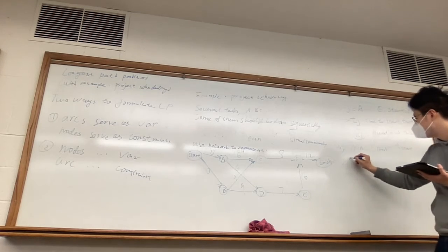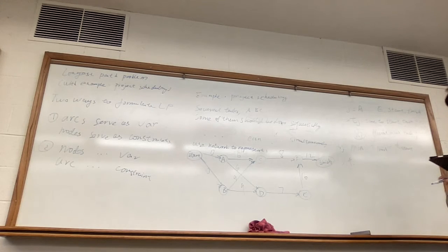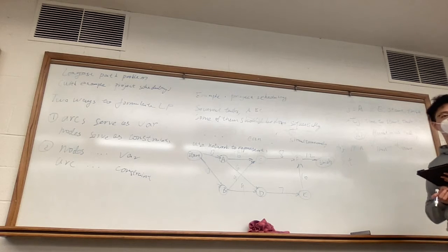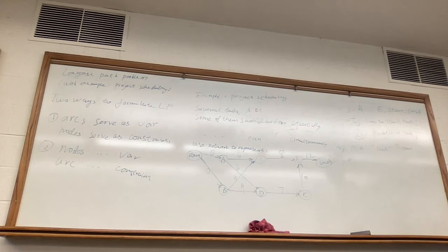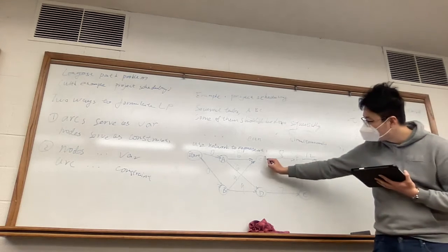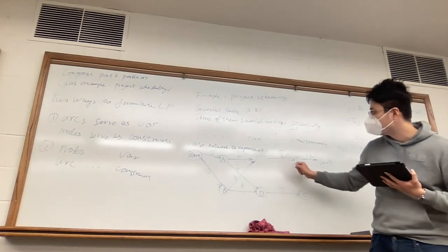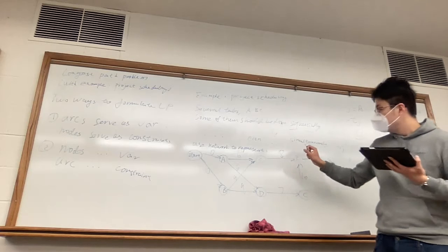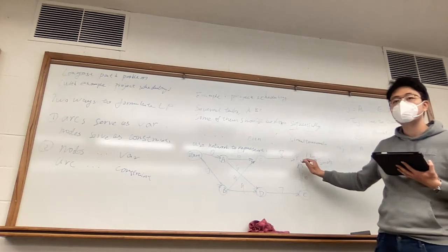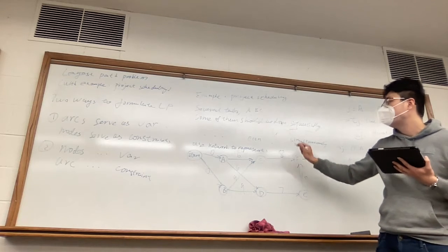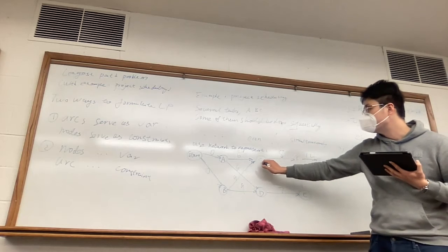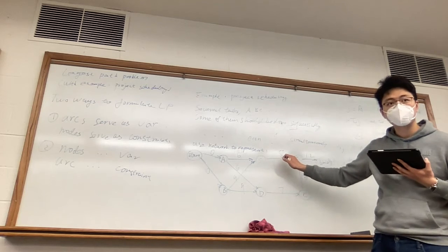What are the constraints? Let me tell you directly. The constraints mean that we look at any arc in this network, say C and F. That's to say, the start time of task F must be at least the start time of C plus 8, right?